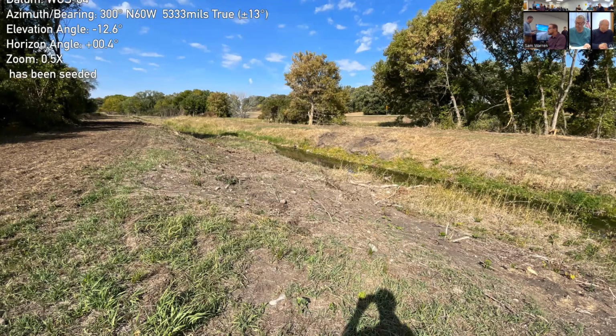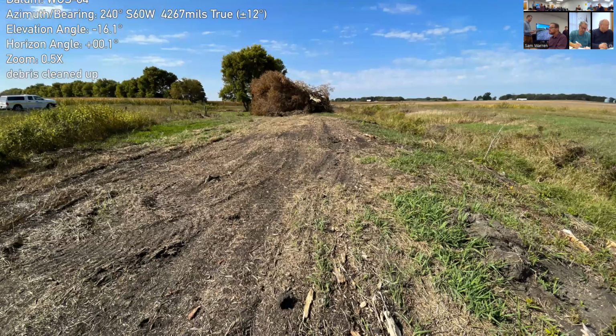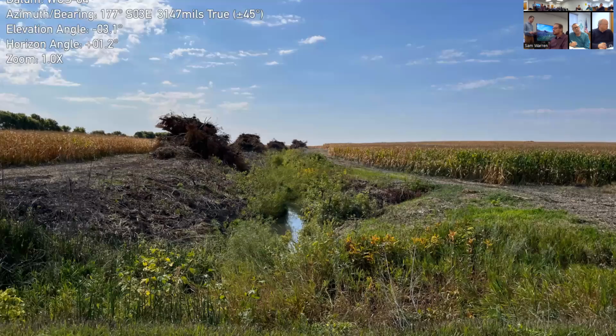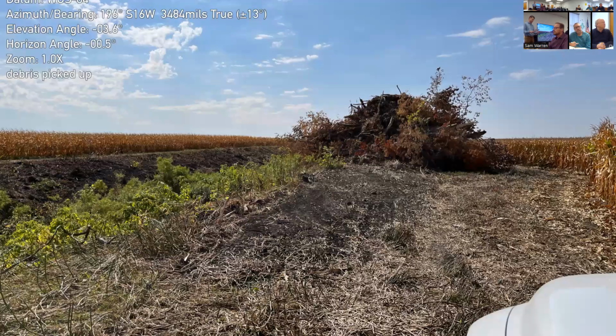On the upper end of the district we hit sand, so we didn't go quite as deep, for the last about 400, 500 feet. And we also didn't lower 2 culverts because of that. There was a savings of about $10,000 for that. The district currently holds almost $14,000 in retainage, which will be released 30 days from today to the contractor.